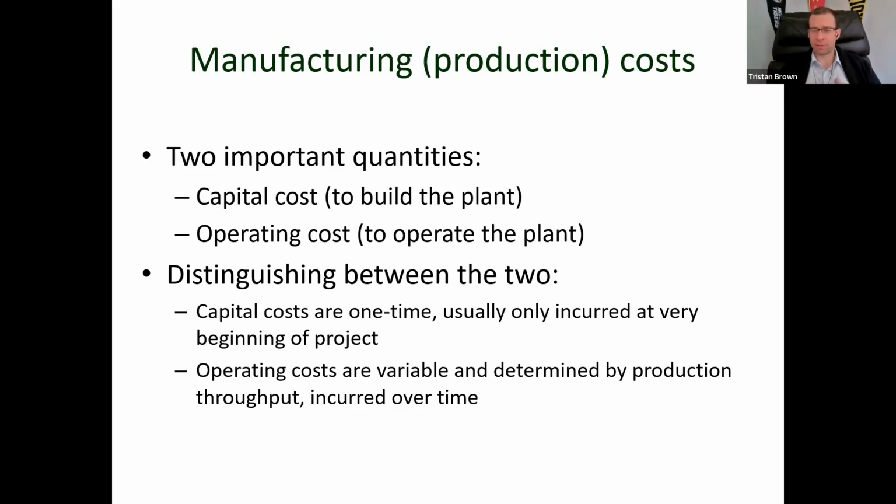To think of it this way, we can think of a refinery, just your modern petroleum refinery. Operating costs, we know that plays a very big role because everyone's seen what's happened to fuel prices recently, right? Gasoline prices have skyrocketed because the input to refineries, which is crude oil, has also gone up steeply. You can just think about how the price goes up and down, and that's going to affect the operating costs for that facility. A lot of other variables as well. We'll talk about what those are, but it's important to distinguish between the two because capital costs are one time up front. Operating costs are over the lifetime of the project.